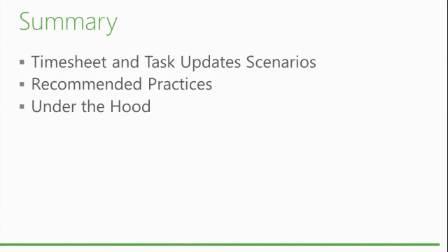Yeah. There is nothing, because of the way the information is stored. Another thing that has been requested is to be able to update in bulk custom fields across many projects, right? And that's another thing that is hard, because of the way the information is structured and stored, where you actually need to open up each project, check it out, before you can modify it, and then check it in. So it's the same for the timesheet, unfortunately.